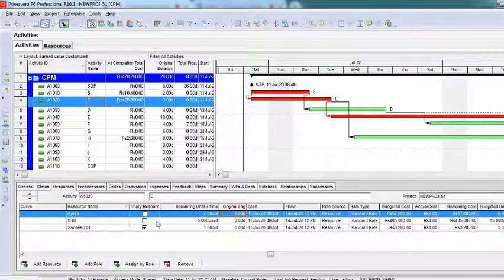So I have 2 Hydras per day working for 5 hours per day. We are working for 3 days, so it's 15 hours, and that's what the cost is being costed. Total units are 6 units for 3 days, no? So 2 Hydra per day, so 2 into 3 is 6. Alright, so this is how the cost is getting added. You can see the cost is getting summed up here, and then the total cost is also seen here.